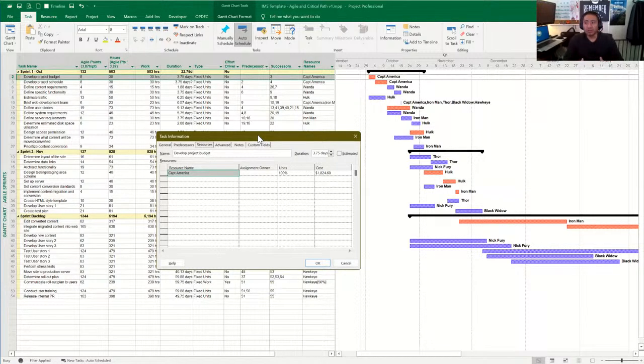Is this realistic? Can this resource be committed to 2 tasks at 100%? So it's always asking questions and trying to unpack the reason of why you're trying to commit a resource to a specific task, because each resource is a dollar.